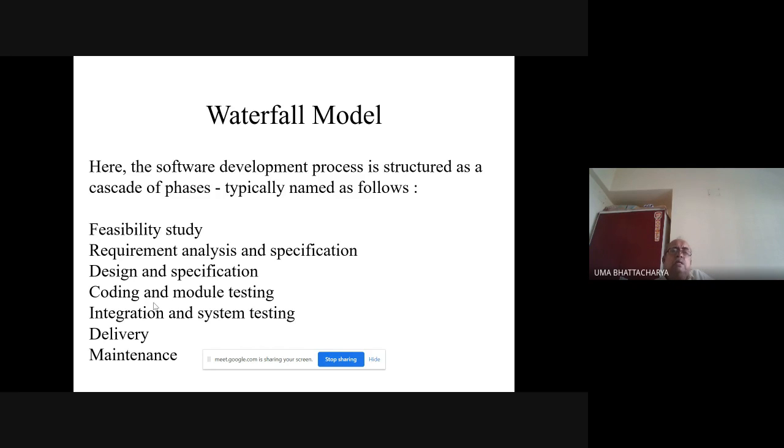I have seen in many cases that at the end of the day, when we receive the tenders, there is a 5-fold difference between the lowest cost and the highest cost. Unbelievable. So the lowest cost is probably 10 crore and the highest cost is 50 crores. And practically, if we are in the government sector, it's almost impossible to go beyond the lowest bid. But probably in most cases, this happens because of inability to understand what is required.